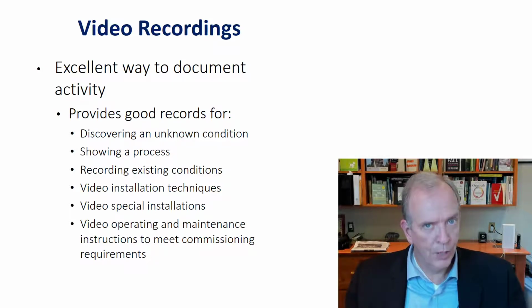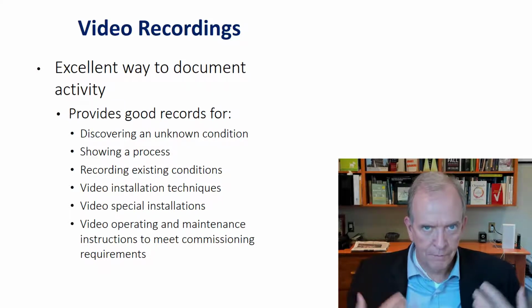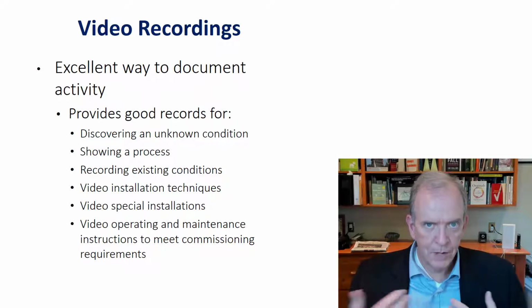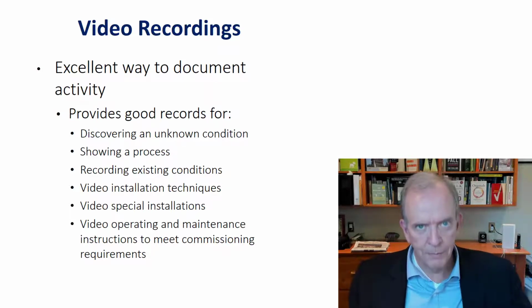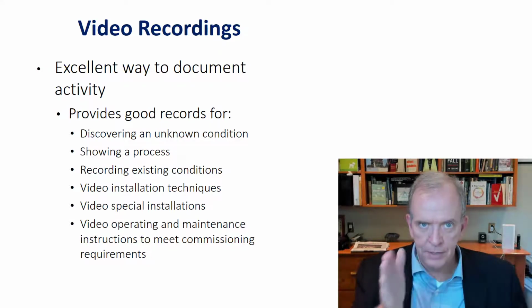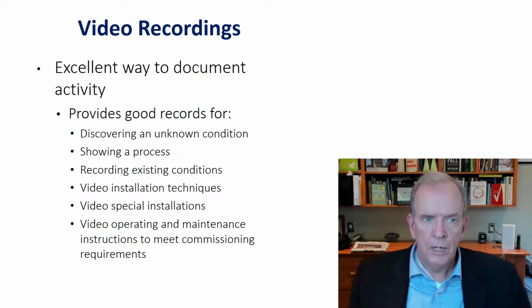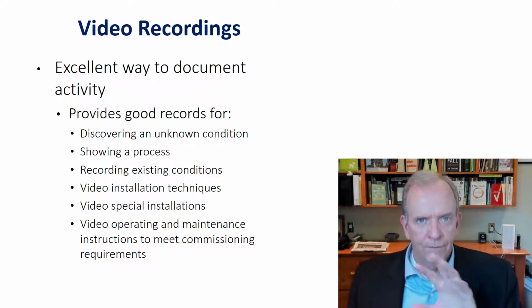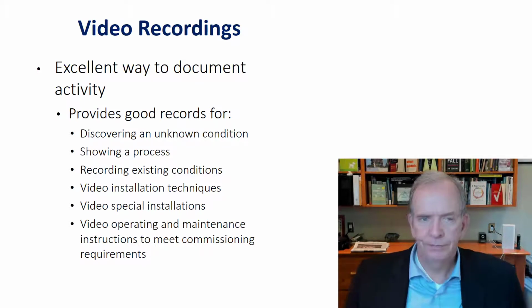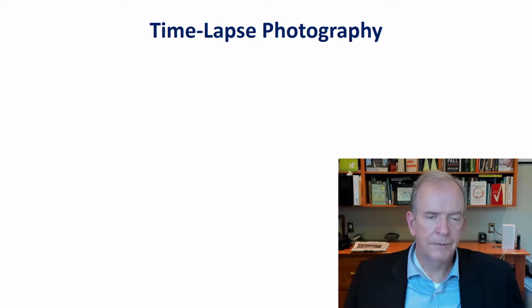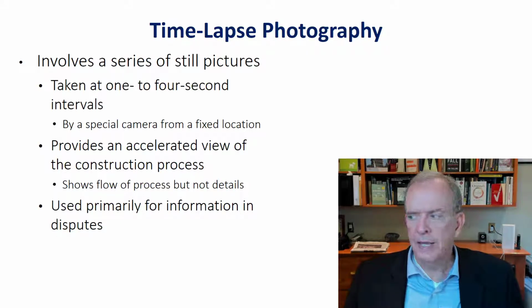See, that's the difference. I always felt pressure when it was cost plus because the client's all of a sudden really looking at how long things take. If things are taking longer for me and our crews and it's lump sum, well, it's my responsibility to deal with my crews, but I don't have to worry about the client getting so upset with that as long as I'm meeting the target time frames. So just differences in how projects are managed and some of the things that go on. But you can imagine 25 years ago what the quality of the video recordings was compared to today. So time-lapse photography, it all fits in that same process there.